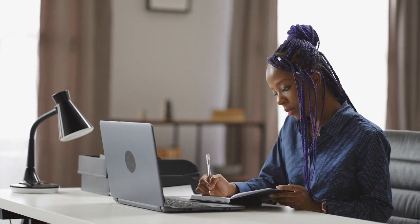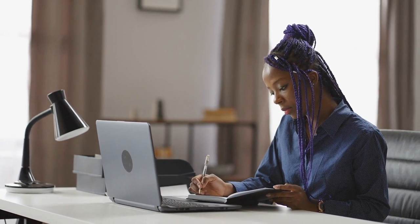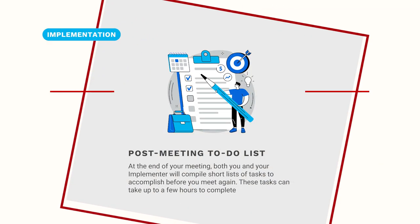Many clients ask how much time they should budget to complete the client to-do list each week. Of course, this depends on the project specifics, but on average we see clients spend between one to three hours each week working on project tasks.